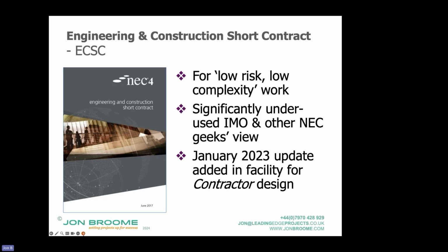And if it was just one of them, I think that would have been justified. But in total, there were 4 areas where they wanted to add in extra features which were already in the longer forms. So ultimately what we decided was the longer form, even though it was, I think, around £1 million, a million and a half, something, which was quite big for them, to be honest. But there's a grey line, shall we say? So it's not a hard and fast rule. So I hope that gives a bit of insight, Charles. Do you feel satiated? Do you feel I've answered it?